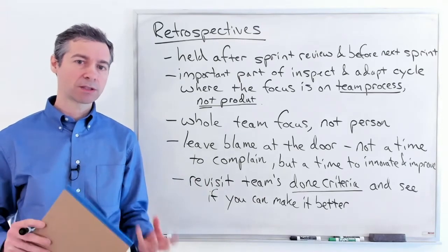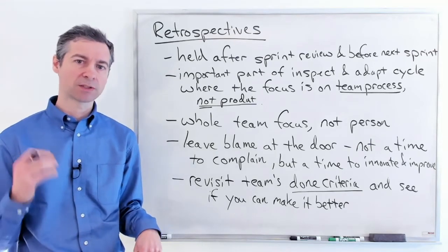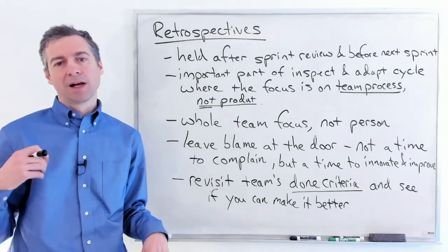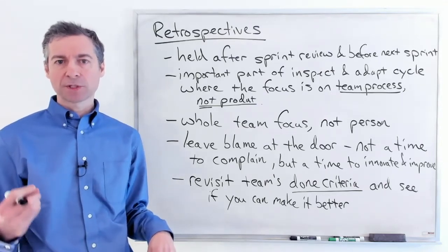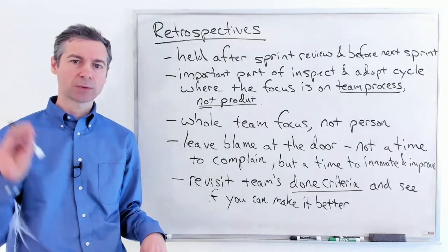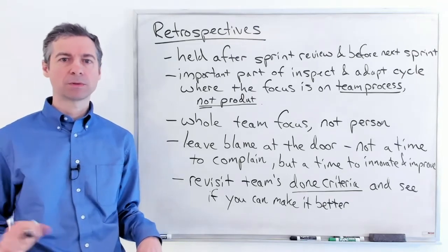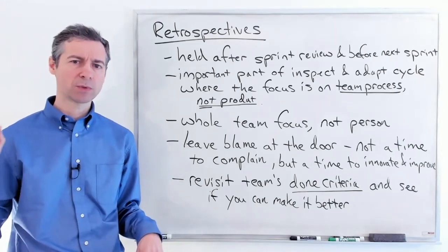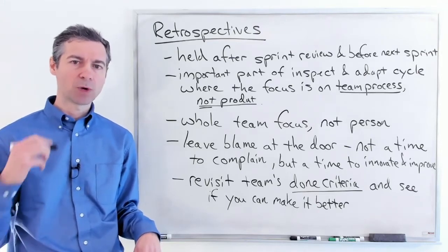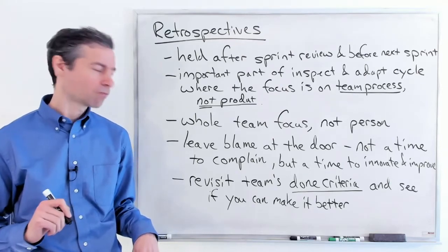Remember, the done criteria is the standards by which the team decides whether or not tasks and stories are considered to be done. It's most captured, in fact, with the notion of, have we decided that this software should be, for example, added to the repository, to the main branch? What really are our standards for that code review? What's our done criteria to say it's truly done and we agree with you that it's done?